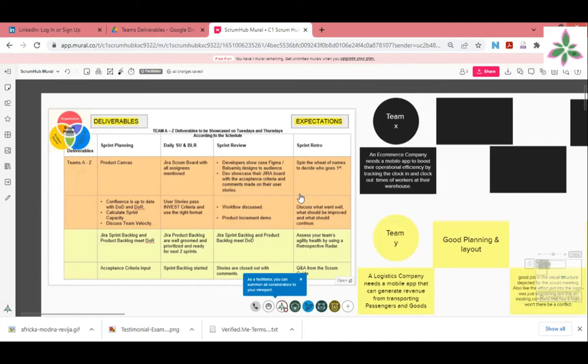The product owner is responsible for anything product, including the product backlog. So the way you guys were doing your simulation, the Scrum Master going to the backlog and actually sharing their screen and opening the user stories, and the product owner is then just mentioning a few things. In the real world, in backlog refinement, the product owner will be sharing their screen, giving all the information, clarity to that specific user story, all the user stories that they're going to bring up for that backlog refinement session.